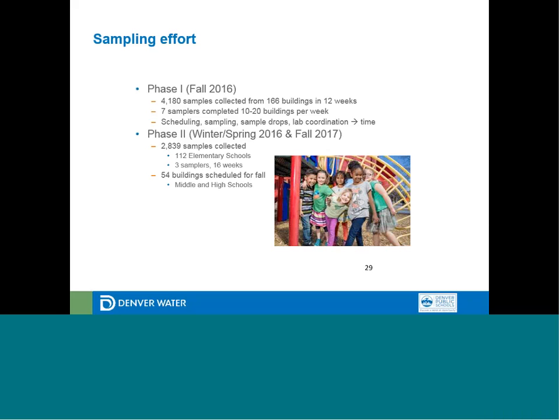Just to give you a sense of the time invested that we did internally to do the collection, we were starting about 5:30 in the morning. It took about 4 hours per school to do just the sampling. It was usually about 1 to 2 hours of sampling in the building, plus half an hour to an hour of drive time based on the size of our district and the distance of the school, and about an hour of documentation to create sample labels, the chain of custody forms that you just saw, and about a half an hour of data entry, metadata, and making sure that we had digital records of everything going on.